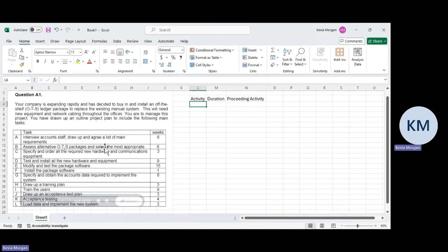Usually, hand in hand with selecting or recognizing which activities you need, we also recognize how long you need to complete the activity, right? So these weeks will be based on previous knowledge. It's going to be based on consultations with experts on this. So in this case, they're installing a system. They most likely reached out to a few persons. Like they said here, they're going to reach out to see which one is most appropriate.